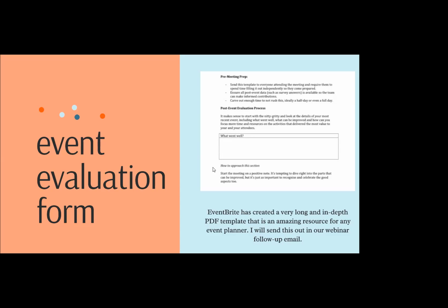I really encourage you to have a form of some kind after an event, even if it's just 1 page, because at this point, even though we're all mostly online, how do we let future event planners know about what we went through and what we learned? Having a document that you finish, this is the last piece that we do, is we wrap it up and then we put it in our binder so that next year when we flip through, we find data and conclusions right then and there.